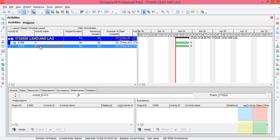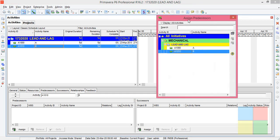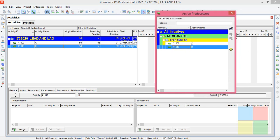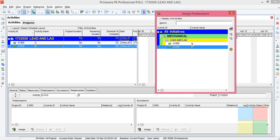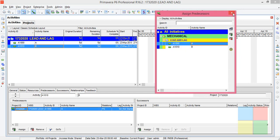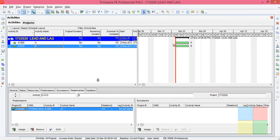So highlight the B activity, then go to Relationships. In the predecessor box, click on Assign. The previous activity is A, then close it. So now when you schedule.